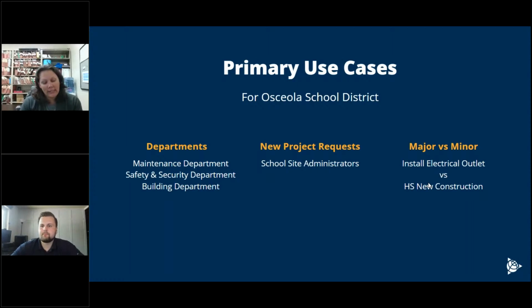Okay. Like I said before, any project that, for example, maintenance or our safety and security department is doing, if that project requires a permit, their project has to be put into Ebuilder. The reason is because they will use the permit process. Let me back up. They will have to provide a plan review to get their permit. And then we have a process for the actual permit. Then they'll do their inspections during the life of the project. And once their final inspection has been completed, that permit process that started after the plan review will kick the project into project closeout, which actually closes out the project.